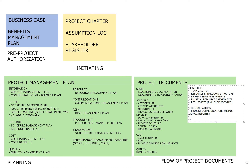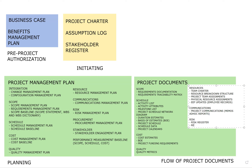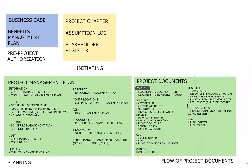Moving into risk, we have a risk register, which documents all our risks and the details about them. We also have our risk report. The risk report is the state of the union regarding risk on the project — it covers the key big-ticket things and is not the same detail you have in your register.